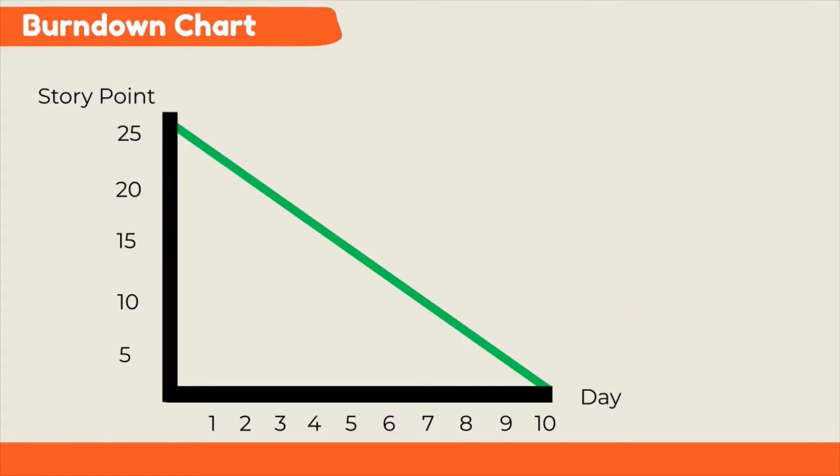During daily Scrum, the team will discuss how many story points they completed the previous day. Then, draw the line by removing the amount of story points completed. Sprint burndown will help the team see very quickly if they are on track or not.